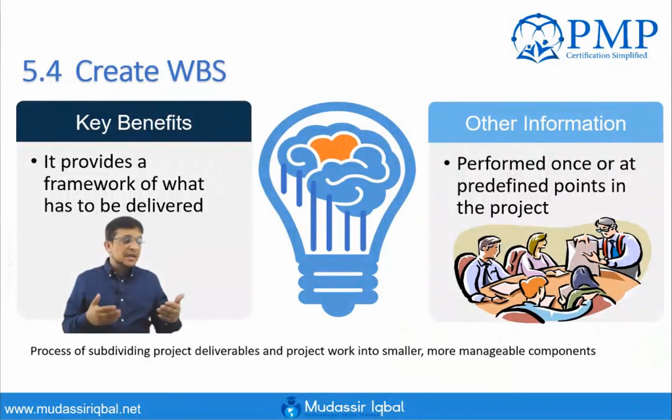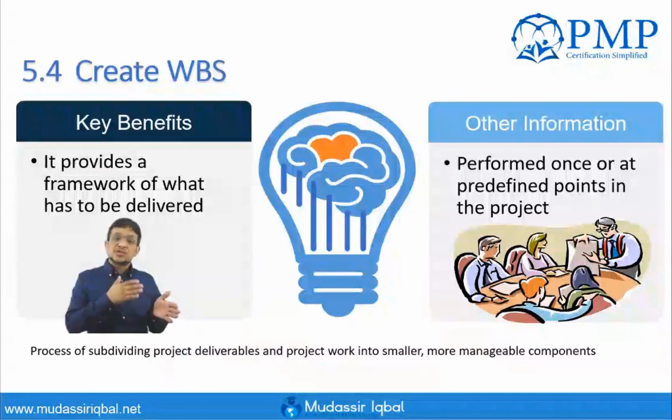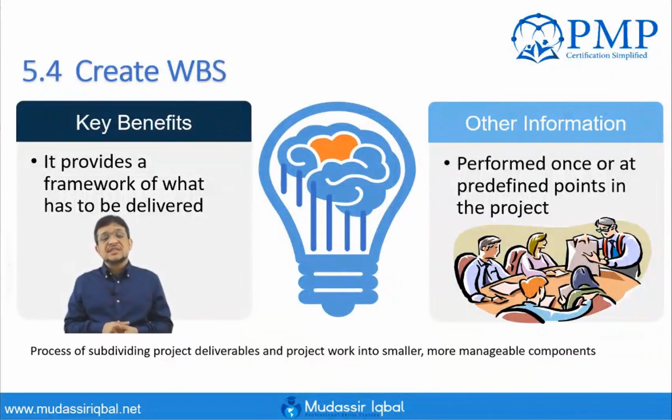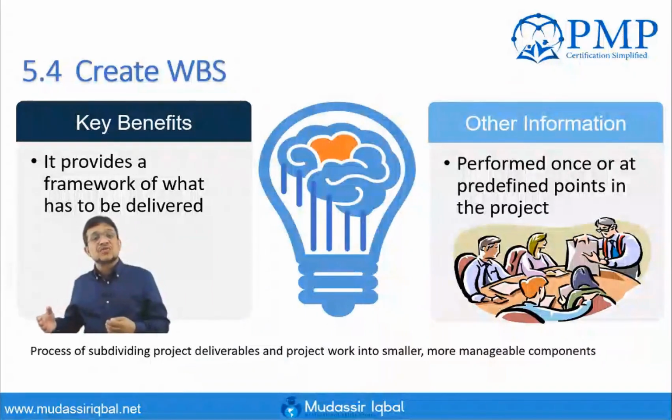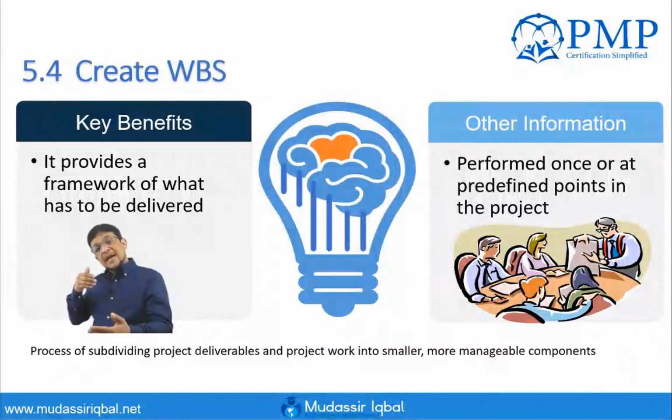At this point, remember that in addition to the project scope statement, the work breakdown structure is the next and most important part of a baseline. You will create a scope baseline as an output of this, and this baseline can only be changed through a formal change control procedure. It will be used as the basis of comparison for what you are actually doing during execution, as defined in the project management plan. This is where I close my discussion on the introduction of Create WBS.